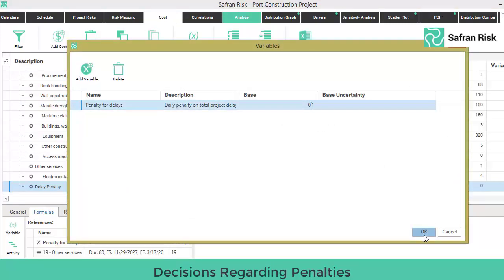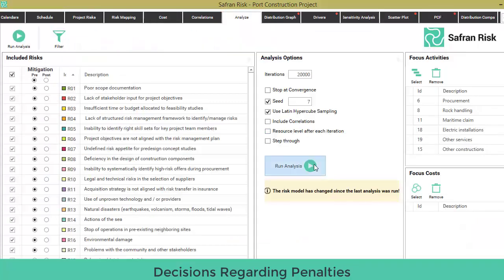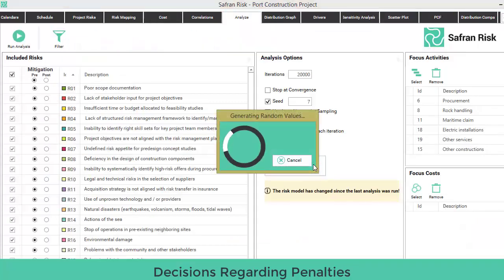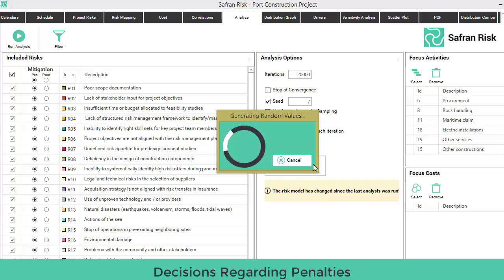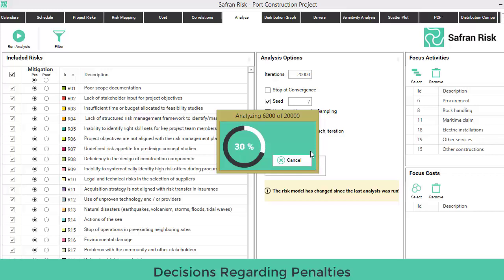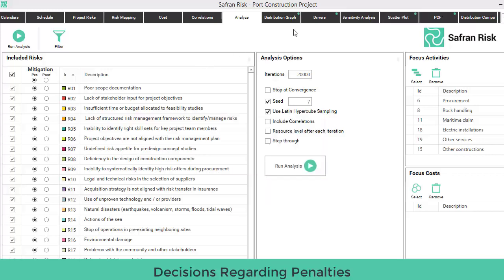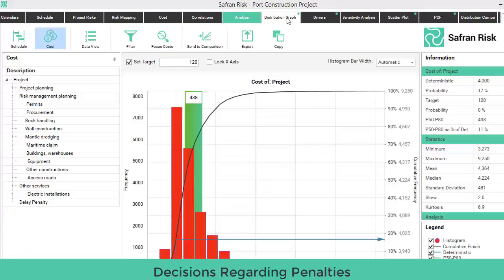The second approach to viewing the impact of penalties is even simpler and does not require any comparison. We would have to run the simulation again, since in the last one we had changed the penalty variable to zero. Thus, go to the Cost tab again, change the penalty base variable to 0.1 — that is $100,000 of daily penalty — and run the simulation all over again after selecting the Analyze tab.